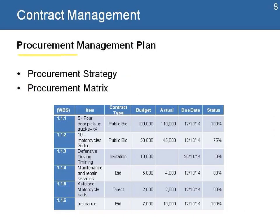The procurement management plan is a process where we identify the procurement strategy and we use a procurement matrix — a simple table that helps us identify the different items that the project will purchase through contracts — and identify not only the type but the budget, the amount planned to spend, the actual spend, due date, and status. We'll have a different presentation on this matrix.